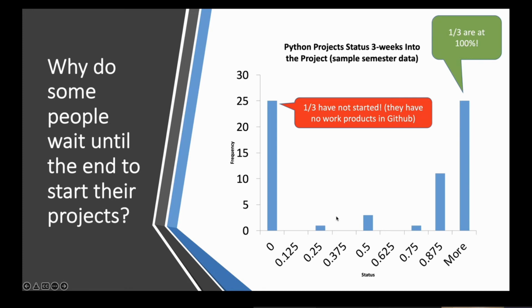I could tell if people had made changes to their README, whether they had the project roadmap file, whether it had any updates, whether there were any code files, and did the code files have any updates. I put all that together and measured it as actual progress, not reported progress, whether they had actually done the work up to that point and were on task and up to date. Because I could automate all that in analytics.